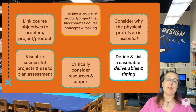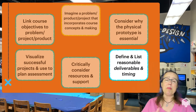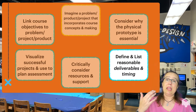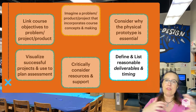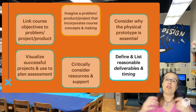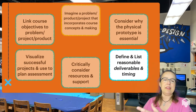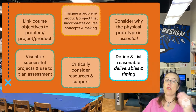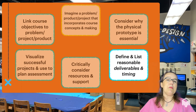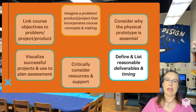If you are having students 3D print a prototype, that takes non-zero time and you probably don't have infinite printers — so there's going to be some scheduling involved. Help the students with that timing by thinking it through. What intermediates might they turn in so they can get partial credit if the printer fails? And what are reasonable deliverables? The students need a 3D printed prototype, but they also need the CAD files they developed, and probably a written reflection on what they learned, and ideally a proposal they present to you early on as to why this is a thing they are going to 3D print.